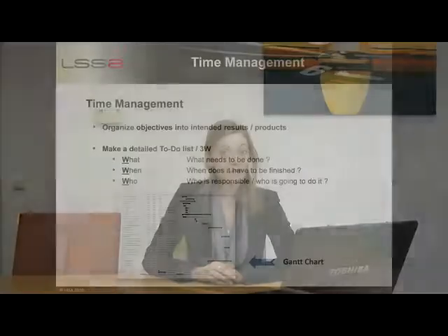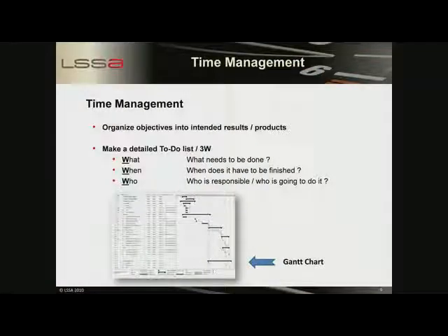To be able to finish a project in the time frame agreed upon in the project charter, the project plan must be made. In most cases, a Gantt chart is used for this. It is a clear visual tool which describes the major steps to be taken, the person responsible for undertaking the action, and the duration of each step. It also clarifies which steps need to be finished before the next step can be started. The critical timeline can be seen from the Gantt chart.